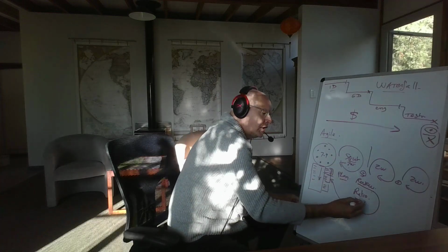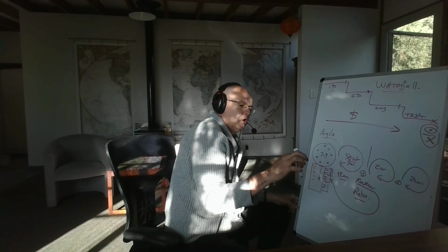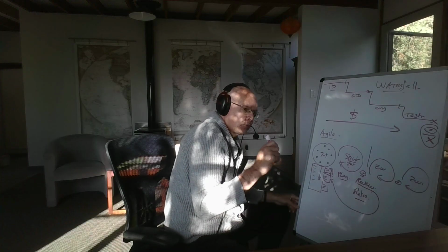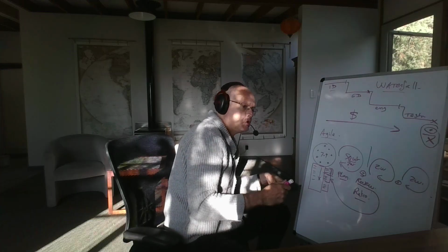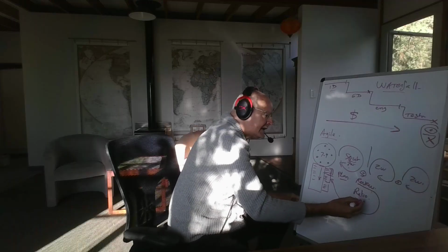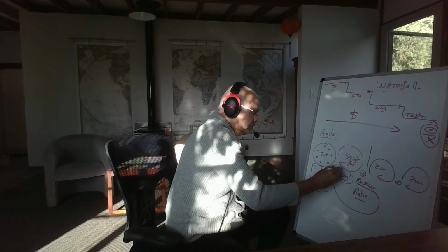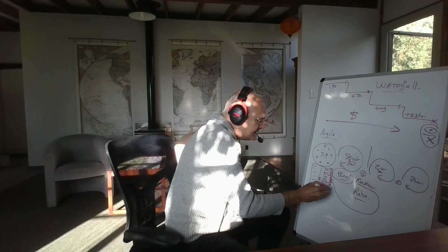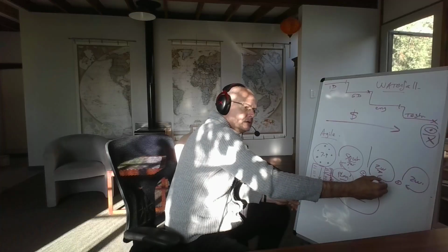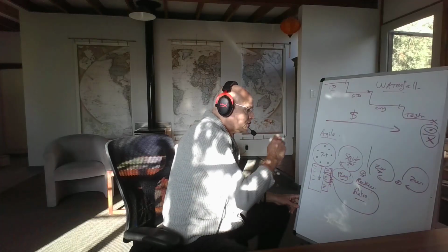We're also going to do another exercise together where we're not going to talk about the game or the features we've just created. We're going to talk about the process. How did we work together and what can we do better to work more efficiently? That is called the sprint retrospective. And when you've done those two things, you then move on to the next sprint planning, where once again you break those down in little pieces of things that you think you can do in 2 weeks, and so on and so forth.